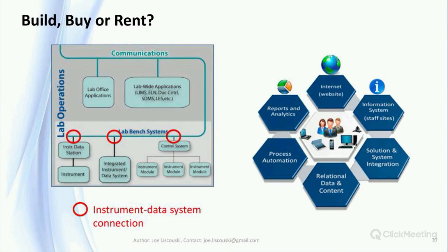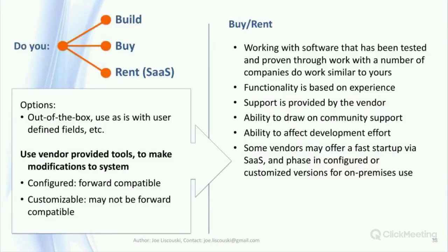The next step in logic may be, well, we'll do all the non-instrument data system work first and then get to that last. The problem with that argument is that the instrument data system requirements may significantly impact the design of the overall system. And if not addressed early in the process, any changes needed to accommodate that functionality would completely blow the schedule and budget. Corporate pressure for other projects may leave it in a software development limbo.